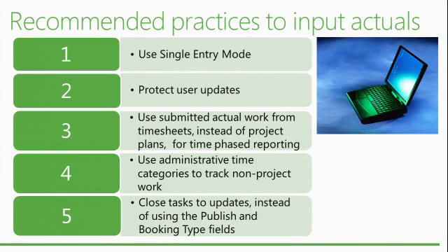What is the list of all the admin time categories or non-project time that is available to record your time. The purpose of this is to avoid having 30 lines of non-project time in your timesheet when you open it, but just to have the specific ones that are the default that show up. And if you need more, then you have a way to select additional ones from a list and put them in your timesheet.